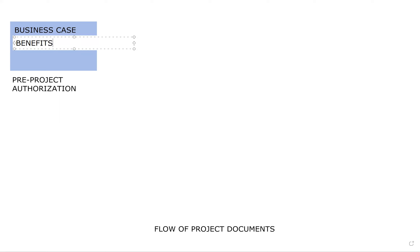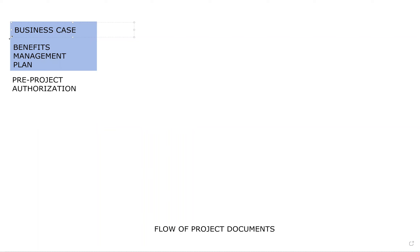The second document in pre-project authorization is called the Benefits Management Plan. The Benefits Management Plan catalogs the benefits that you expect from the project. And throughout the life of the project — and even beyond it — the Benefits Management Plan is updated to reflect the accomplishments of those benefits.